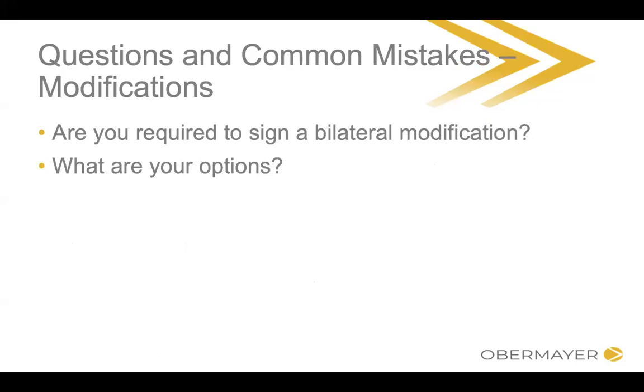So, a quick wrap-up with questions, comments, and mistakes relating to modifications. Are you required to sign a bilateral modification? Yes, which is why you want to be very careful about signing one with waiver language. Ask them if they will issue it unilaterally. You are not required to sign a unilateral mod.